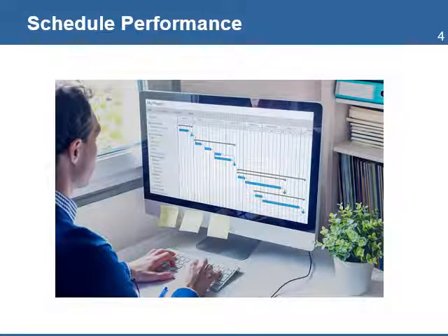On a regular basis, the project team will submit progress reports on the activities they are responsible to complete. You will use this information to determine if the project is on track or delayed. For example, if an activity is reported to have lasted more days than originally planned, but the activity is not on the critical path and there is enough slack to cover the delay, then the project aim might not be affected and no action is required. But if the delay occurs on an activity in the critical path, then the project will be delayed.